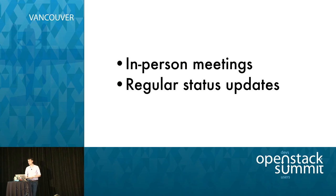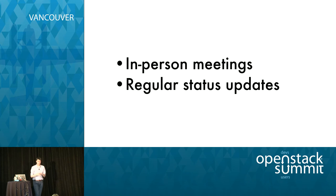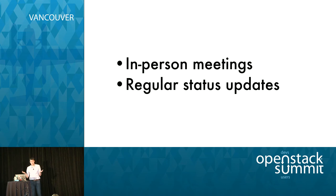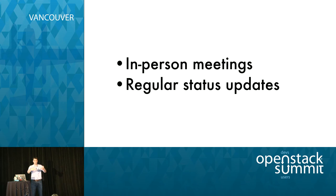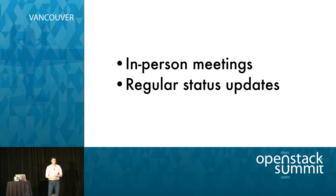That's a big ask and does exclude people who cannot travel. But it's really good for getting really good communication going. The Swift community people who have been doing that — I see some of them here — thank you. It would be impossible without that. The important piece with regular status updates is to get into the default workflow. When somebody working on this wakes up in the morning and opens their computer — don't create new tools that disrupt their normal workflow. Build a custom Gerrit dashboard because they're already in Gerrit.